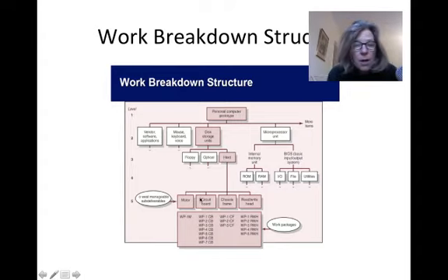Now under the hard drive, they need to think about the motor, circuit boards, chassis, read-write head. Each of those then has what they call work packages. Now we might call these activities. In fact, we are going to be calling them activities.